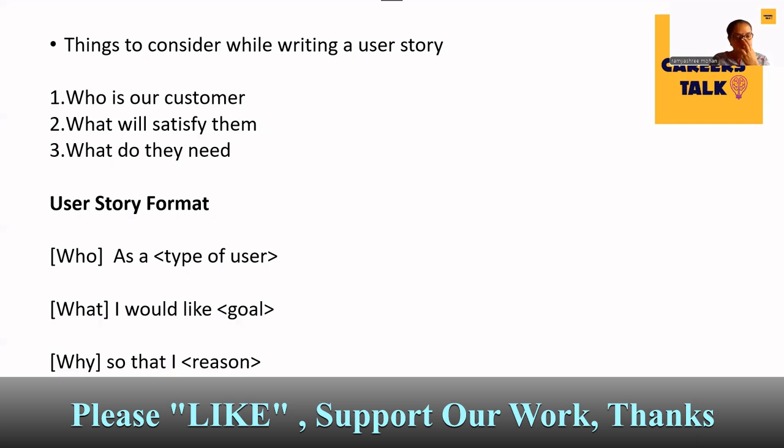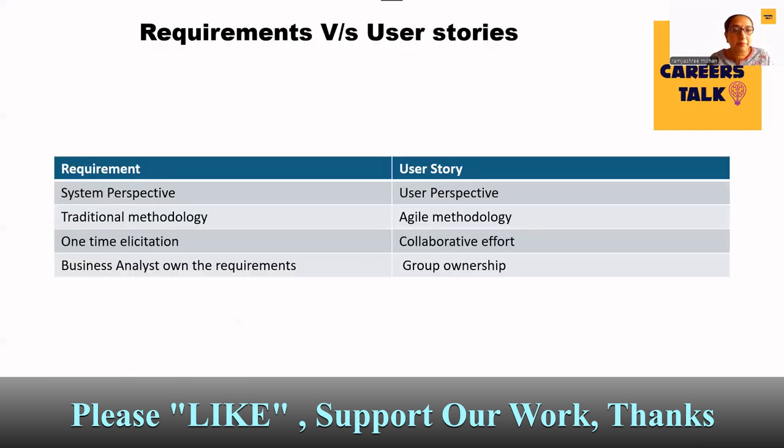For example, as a type of user, what I would like to do and why I need to do it. For example, as a user or as a customer, I would like to sign in so that I can purchase the products online, right? This can be one user story format.